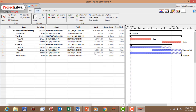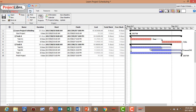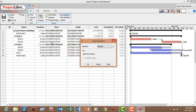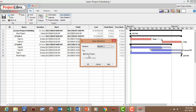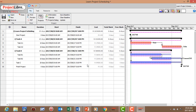Now let's save the project as a baseline. Go to the File menu, select Save Baseline, choose Save Baseline 1 for the entire project, and click OK. Now we've saved the project as a baseline.